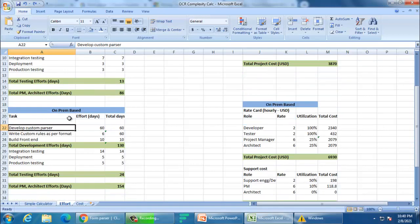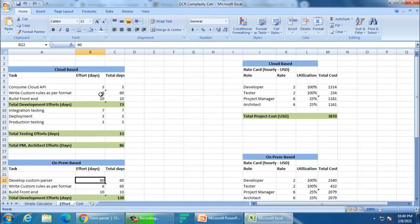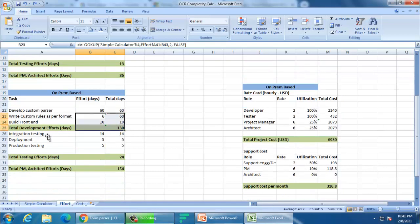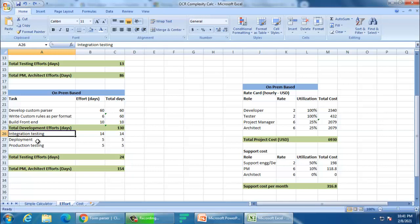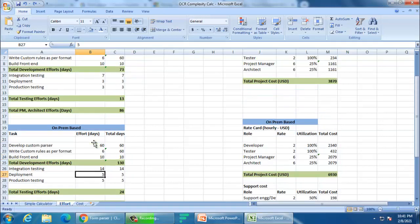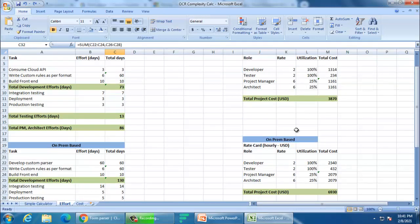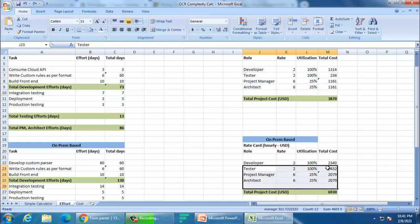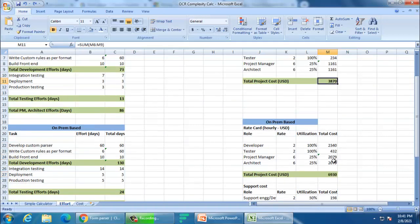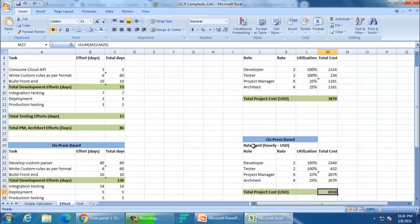For an on-prem solution, you will not consume the cloud API — instead you write your own code for Tesseract, OpenCV, and Tabula. Let's say you take two months, about 60 days, for this. The other numbers are mostly the same, but because it is a custom solution you may need more integration testing, more deployment effort, and more production testing, so those numbers are increased. Using the same formula and rate cards, the total on-prem one-time cost comes out to $6,930 — roughly double the cloud cost.